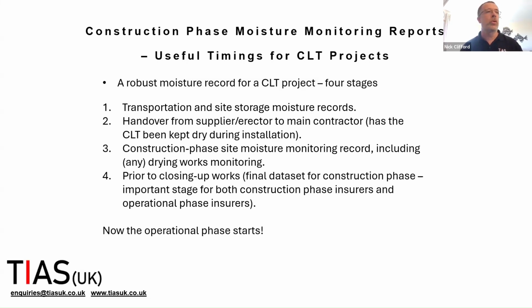From handover, your supplier or erection crew will be building the building for you and then handing it over to the main contractor. At that point of handover, you as a main contractor should be expecting to receive a fairly robust moisture monitoring report that includes the sort of data that we talked about earlier, so that you can be sure that the building is dry on handover to you.